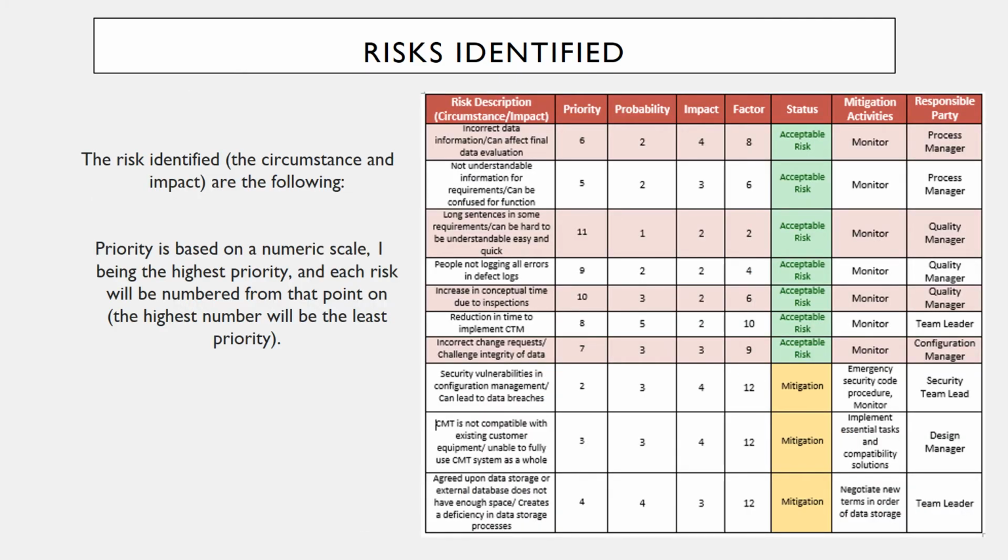Monitoring of mitigation plans. We're going to do evaluation of the risk parameters. We're going to be observing the risk matrix. We're going to determine the best mitigation handling methods for this description, and we're going to come up with some mitigation plan. We're going to use this table, and also we're going to have some retentivity process that will be required weekly in order to monitor each change that may occur, each risk that is listed on the table. The mitigation plan should be included in the description of the risk, and also we're going to do some priority, risk parameters, current status, mitigation activities, and the responsible parties.